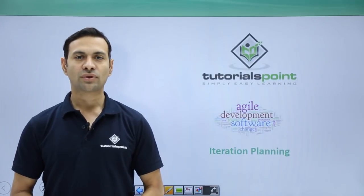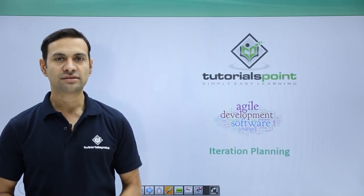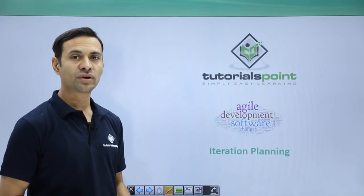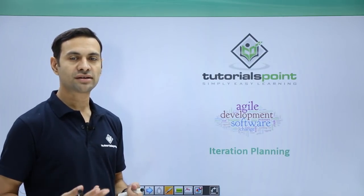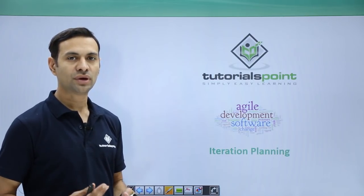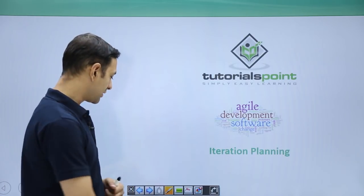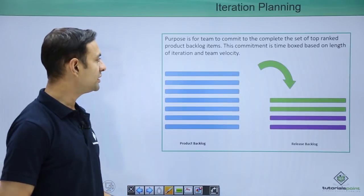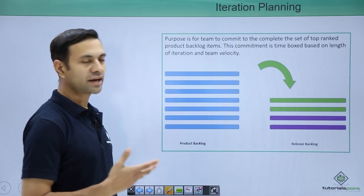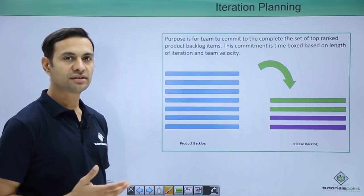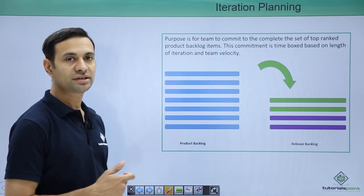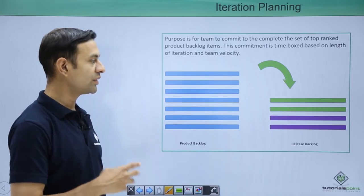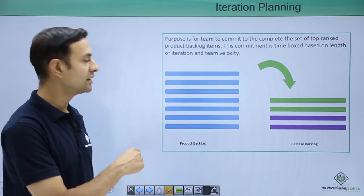Hello friends, welcome to Tutorial Point. In this session I am going to discuss iteration planning — what iteration planning is, how to do it, and who is going to attend it. The purpose of iteration planning is for the team to set commitments for each and every user story they are going to do in this particular iteration.